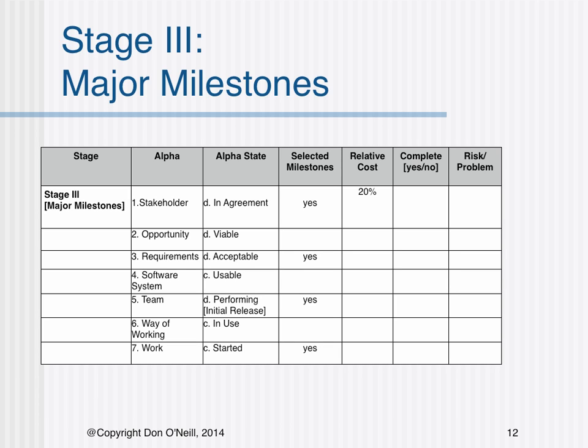Stage 3 entails completing major project milestones. Stakeholders are in agreement. The opportunity is viable. Requirements are acceptable. The software system is considered usable. In addition, the team has performed an initial release, the way of working is in use, and work has started. The critical selected milestones revolve around stakeholder agreement, acceptable requirements, the team performing the initial release, and work having started.